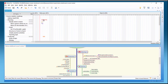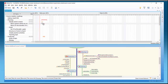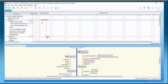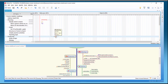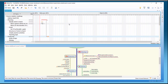Going back to days view, we can see Planning and Producing. Zooming into a closer view on the timeline shows what needs to be done first and who's assigned to it. I want my planning to be complete before producing starts, so I can drag the arrow to make sure the dependency is enforced — it won't let me bring it back past that point.